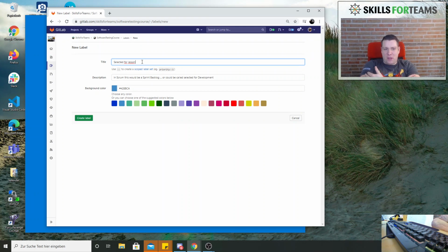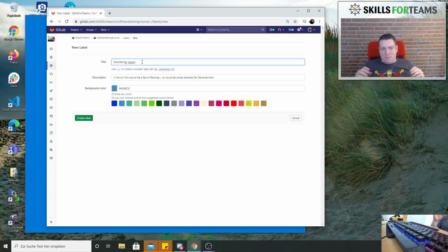And no matter if you're using Scrum or another system like Kanban, or created your own framework, it's useful to have a certain point where you decide to do something. In Scrum, it's originally the planning meeting. If you don't have Scrum, you can even decide inside the daily when somebody is going into development, but I think you should make that decision explicitly, and not just get things into development without anybody deciding it.